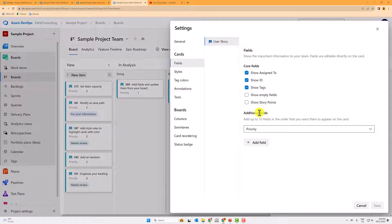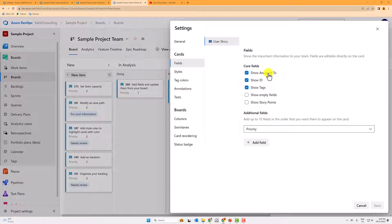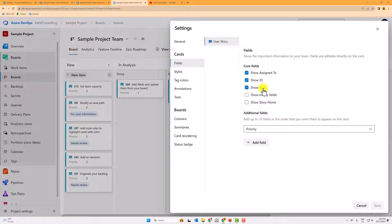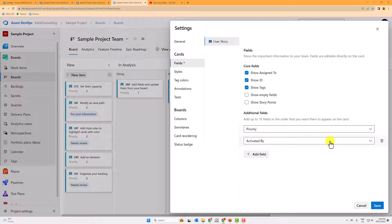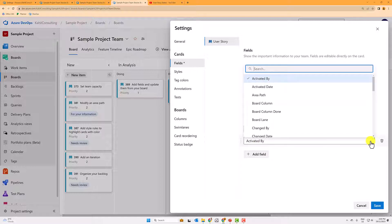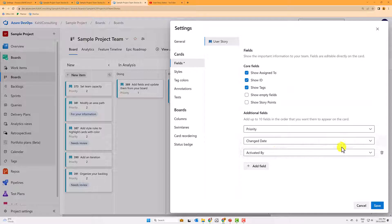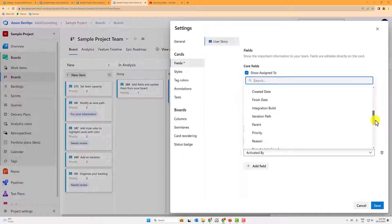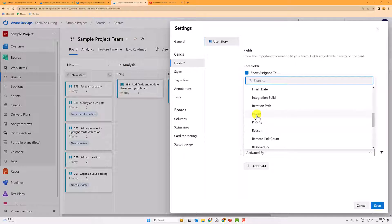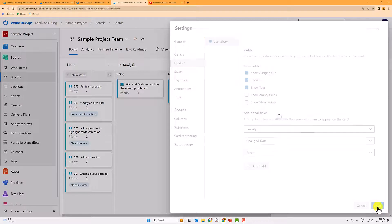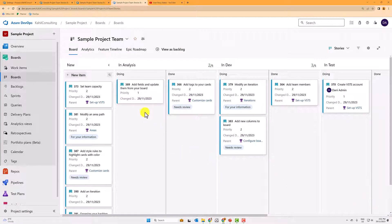And here you can effectively decide what fields do you want display on those cards. So you can see additional fields priority. By default, it will show the assigned to, the ID, and any tags that you have. You can un-tick those, but you can add additional fields. So I want to add here, for example, the change date. And I want to add, and those are two that I often add just for clarity. And I want to add the parent, because I want to see the feature where that user story is related to.